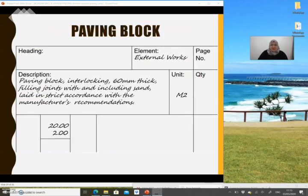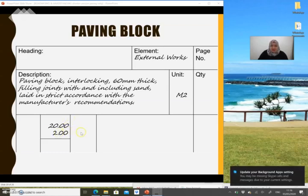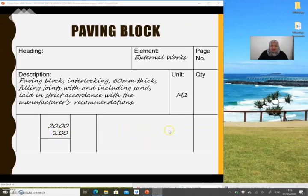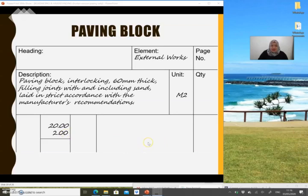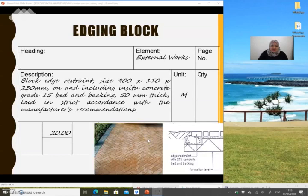For the paving block description in your bill of quantities: supply and lay interlocking paving block, mentioning the thickness — which you find in the cross section of the drawing — filling joints with and including sand, in strict accordance with the manufacturer's recommendations. The unit is meter square. You should fill in the length and width dimensions and write the location of the paving block so that the next person checking your slips of paper can easily verify the dimensions.